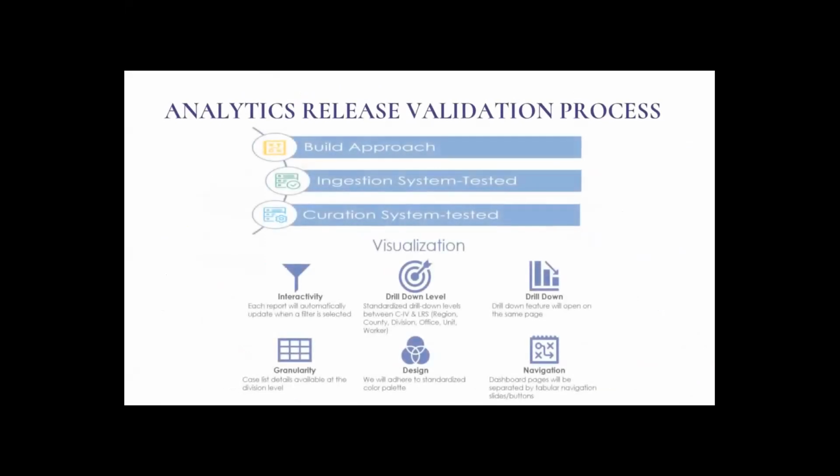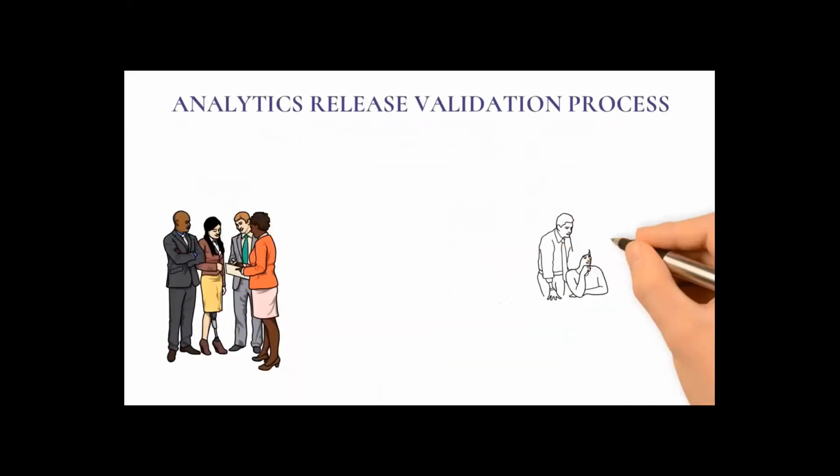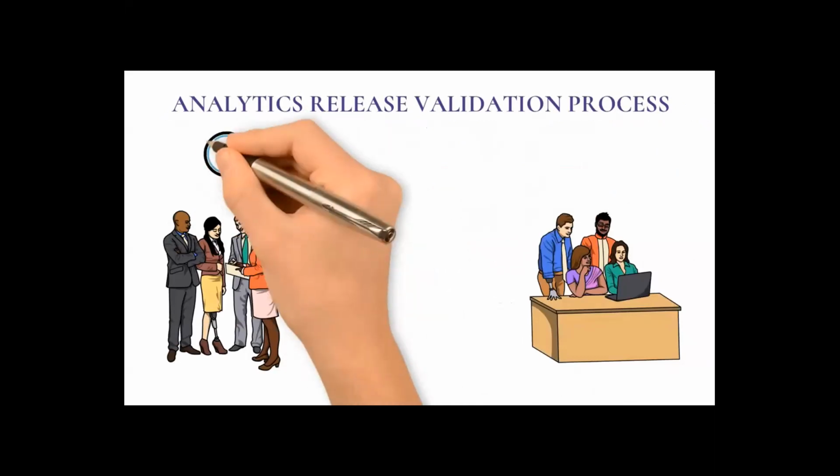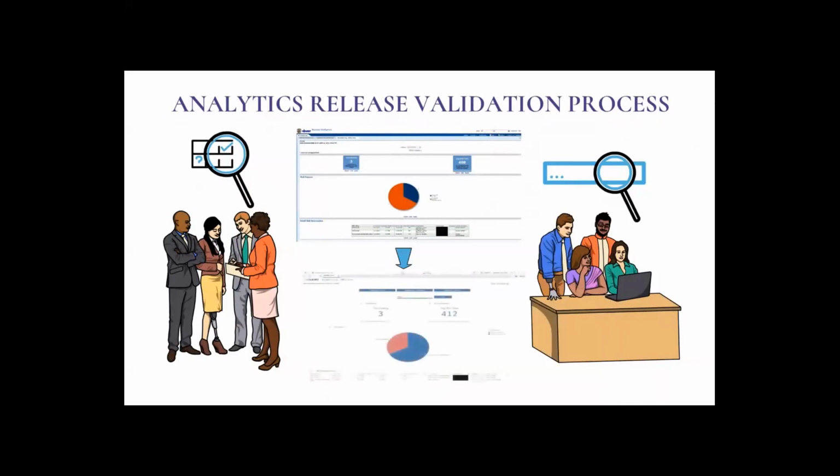After each replatform dashboard and report has been built, each with respective areas of ingestion, curation, and visualization system tested by the Accenture Analytics team, it is handed over to our Consortia Data Integration Services team, who performs a thorough examination. Following this internal validation, we then engage the user acceptance testing team and state liaisons, who along with the recruited subject matter experts, meticulously analyze every detail of the source and target dashboards and reports to ensure as much like-for-like visualization and, most importantly, complete data integrity.